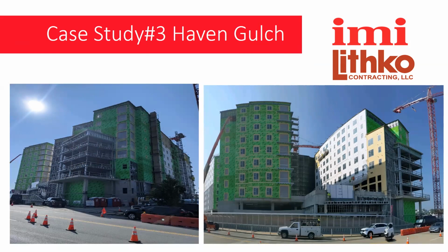Not only did we have to meet early and later day strengths, but we had to meet shrinkage requirements as well for this job, so we had to do all the testing for that. The elevated slabs had to be around 5,500 to 6,000 PSI, and we had to hit 3,000 PSI within 1 to 2 days. Overall, project-wise, we didn't have any issues with any breaks and no issues to the schedule for the contractor.